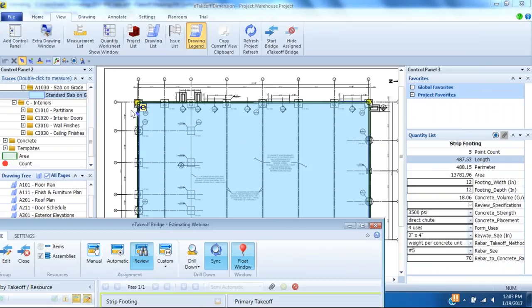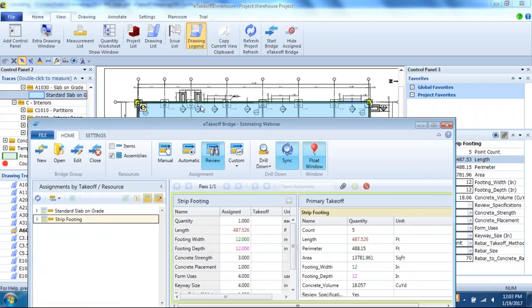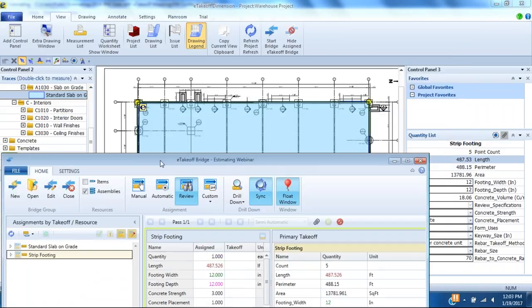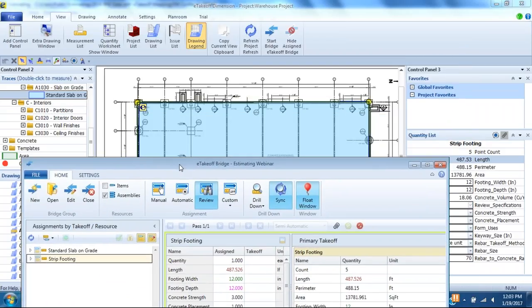Now what we can do is if this is a new set of drawings, we can make changes to this original and it will drive those changes back to the estimate for us and tag it with whatever we want to call it. So it's an incredibly powerful tool. We've finally taken an integrated takeoff with our estimating tool with audit trail back to the takeoff and then back into the estimate. We want you to spend most of your time in your drawing, performing takeoff, completing your estimate at the same time.